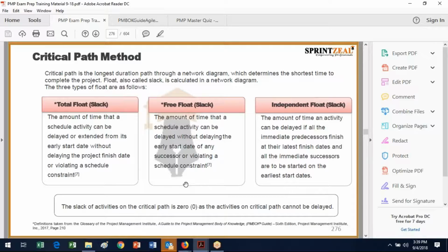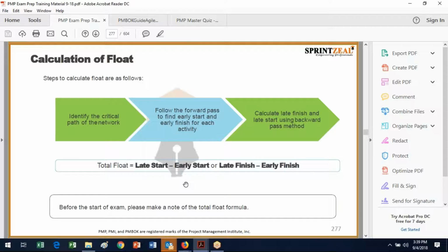Well, I think what they're really looking at is that if you started a task that was dependent on the next task, you don't want to push the next task. But in the total float, you could push the next task as long as that task didn't push into something that changed the endpoint. So it's all about the endpoint in the total float, and it's just about the adjacent tasks in the free float, as long as it doesn't impact the adjacent task. Right. So the overall.